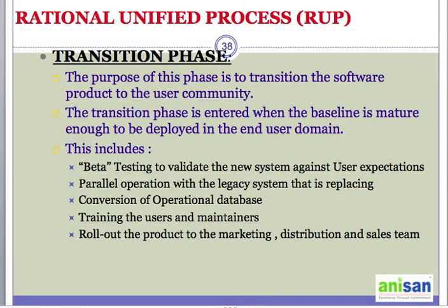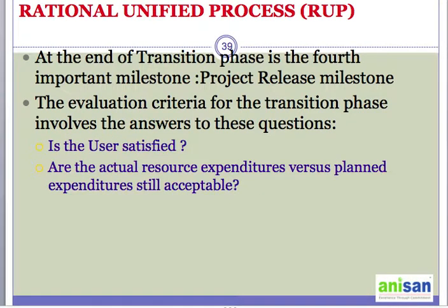there is a little more to it. This particular phase is focusing on the activities that are required to place the software solution into the hands of the users. So you'll have to ensure that it is a smooth transition, and typically this phase includes several iterations including beta release, general availability releases, as well as bug fixes and enhancement releases. So those are the typical activities that will happen during the initial days.